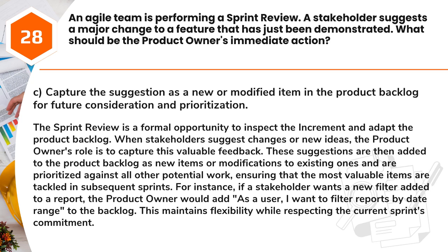For instance, if a stakeholder wants a new filter added to a report, the product owner would add, as a user, "I want to filter reports by date range," to the backlog. This maintains flexibility while respecting the current sprint's commitment.